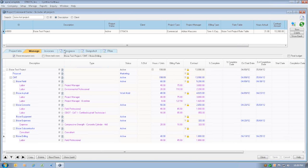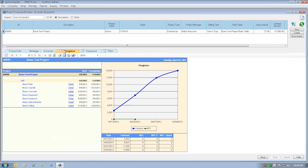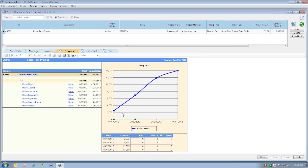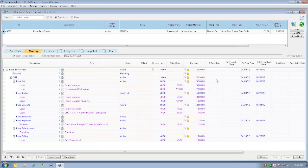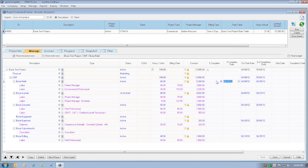We can go back to the Progress tab. And so now it's going to chart out what the contract should look like. This legend here is indicating what our contract spent is going to be from beginning to end. If we go back to the Manage tab and enter a percent complete for the work that we've done so far, like let's say we think we're about 20% done with the Boise field phase, we'll enter that there, and it'll automatically complete our percent complete date for us.